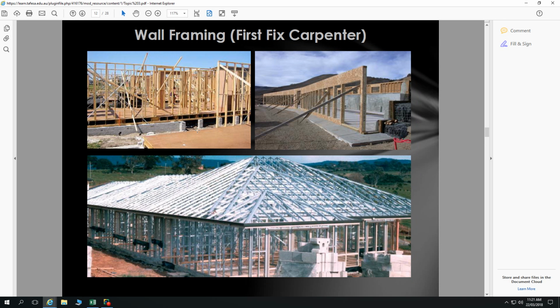So given our 7 days of our concrete curing, during that process, yes, we do not want to go stacking pallets of Besser blocks on our slab. We do not want to go getting our trusses craned in on that, or you don't want any trusses craned in there anyhow because they're going to get in the way of the wall frames. You don't want your packs of timber craned in and put on top of your slab. Leave your slab alone. All that stuff either has to go on site if you've got space, or if you don't have space, has to go somewhere off site where it can be brought in quickly as it's needed by the timber framers or steel framers.